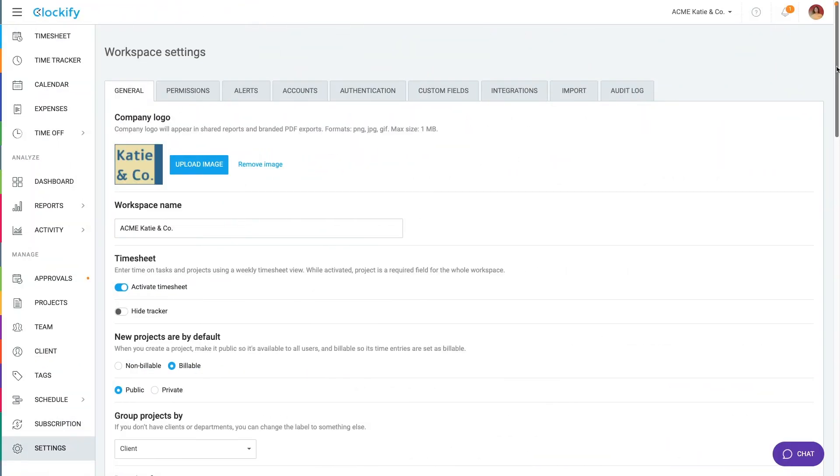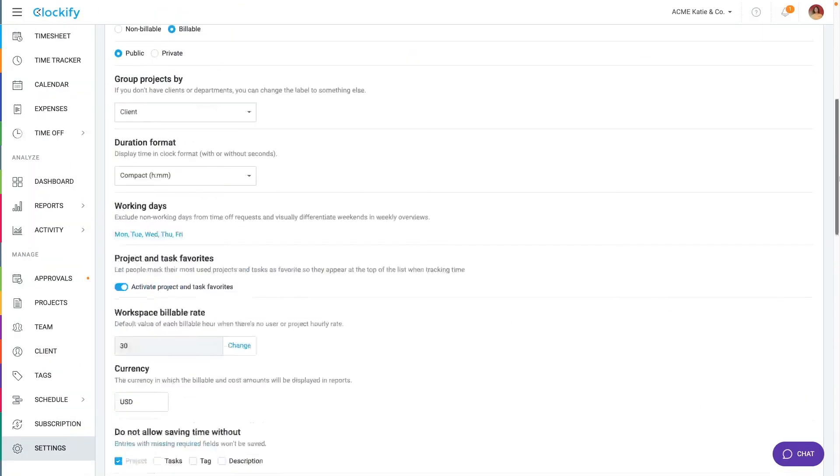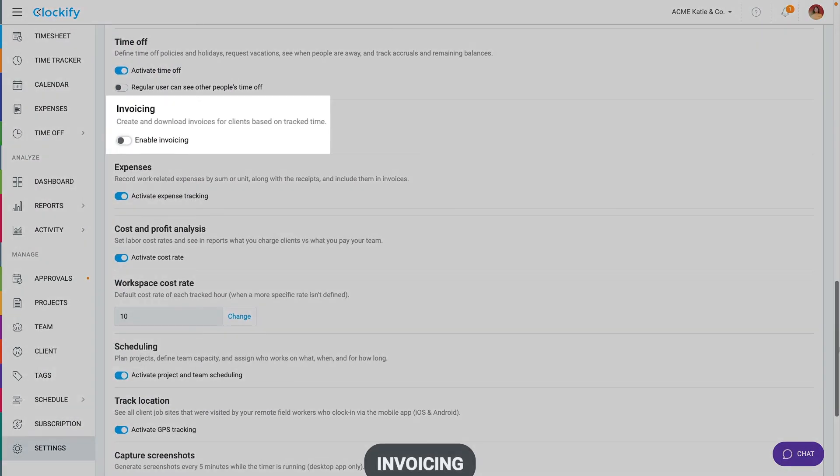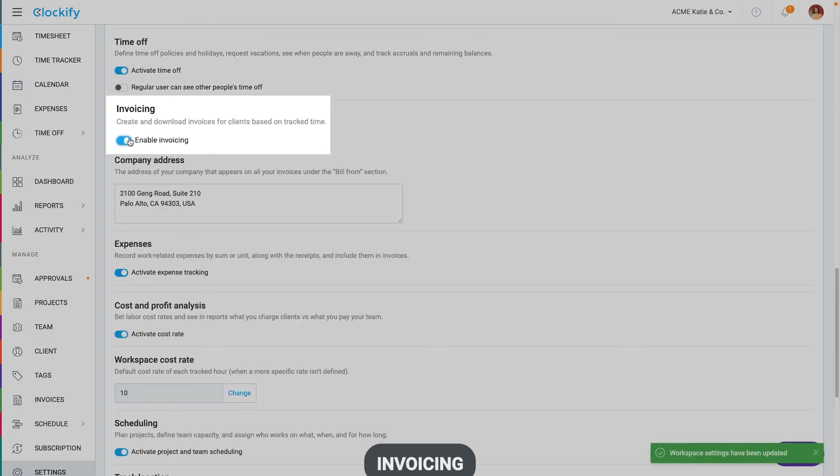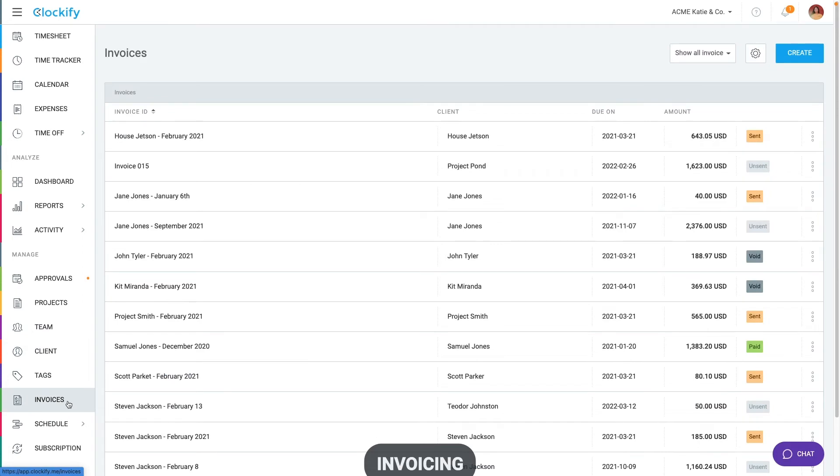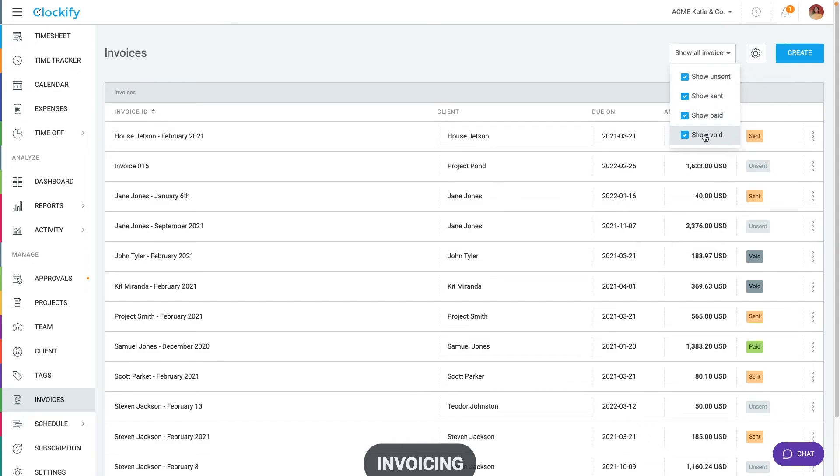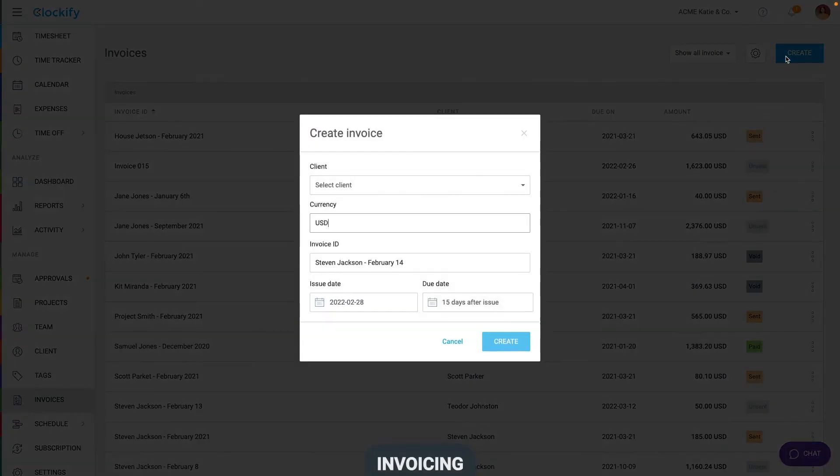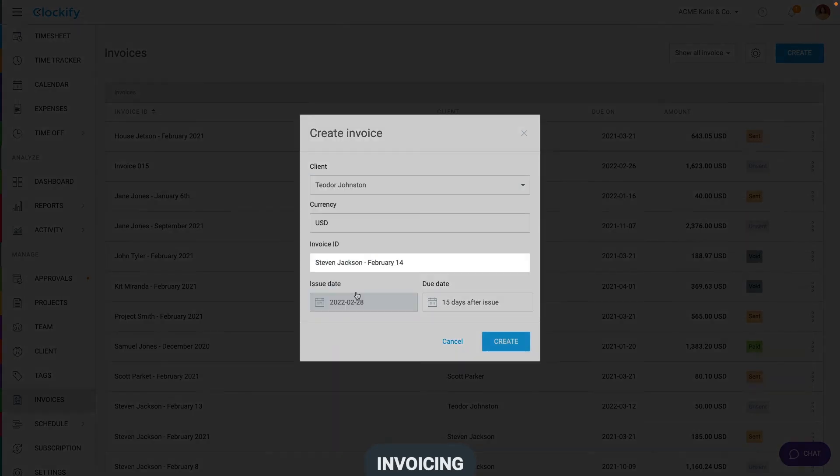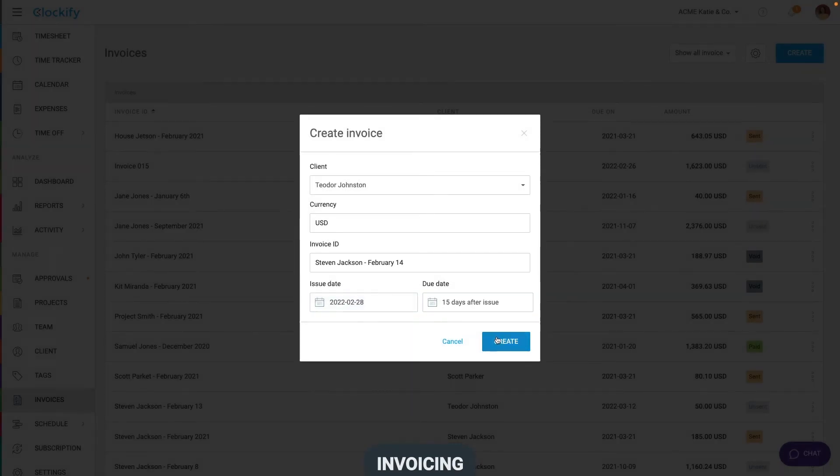Finally, let's cover how to invoice clients. First, enable invoicing in workspace settings and then go to the invoicing page. Here you can see all your invoices and filter by their status like sent, paid and void. To create a new invoice, click create and choose a client. Invoice ID, currency, issue and due date all look fine so we'll click create.